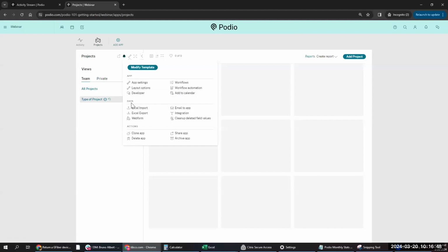And then for the data access, this is a question we get asked quite often. The ability to get something in from Excel, we very easily import and export with Excel. You can either export it out into a spreadsheet or be able to import it in. That way, any existing work you have that's saved in that platform, you're able to just pull into your template once you have your template set. And that's done by using field mapping. So you can define which fields of that spreadsheet need to pull into which areas of your template itself.